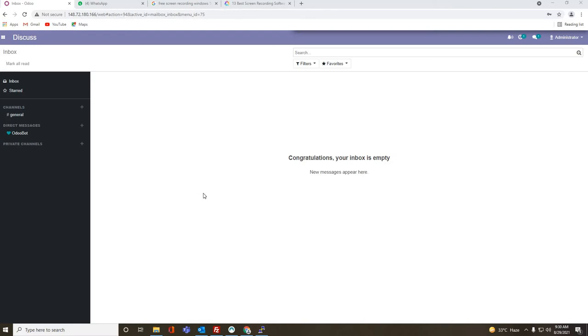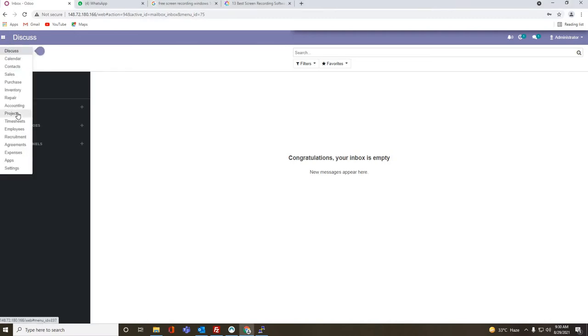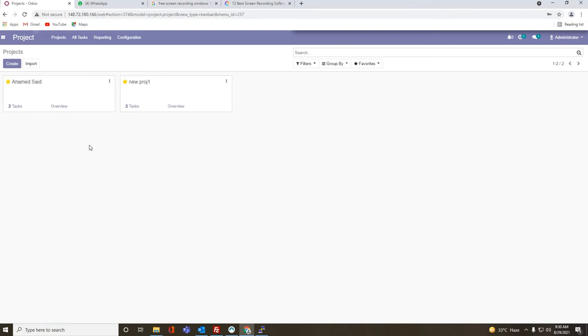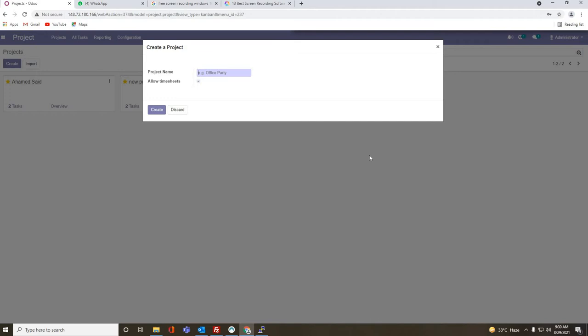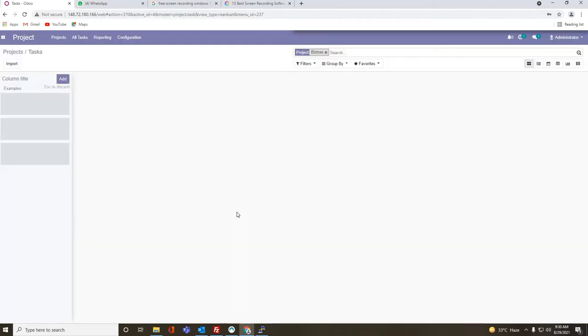That is creating a project, creating the stages for the project, and creating the tasks for the project. In this video we will be talking about these three things, which we consider master data for the project, which is pretty easy. You can go to the project module here. When you go to the project, you can click on the create button and give the name. I'm just giving the name as Bistras and clicking create. Once you do that, you're done with the first job, creating the project.